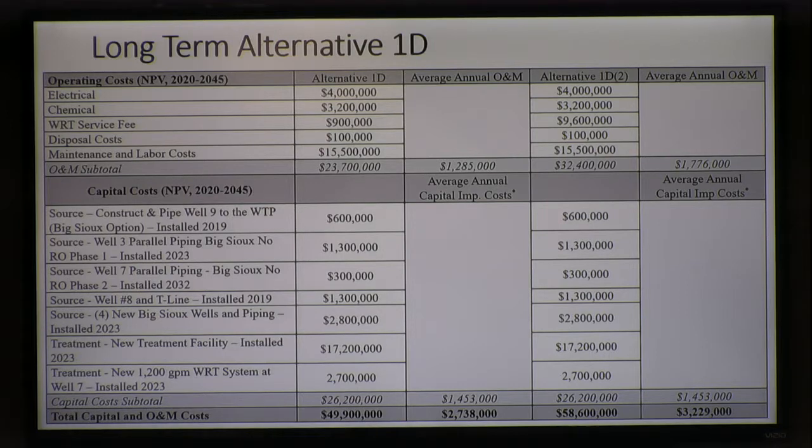You look at that and you go, electrical, 4 million? Yeah, that's 4 million over 25 years for electrical. And the purpose for doing that is to enable these costs to compare on an equivalent present value. You have to bring all of those costs to the present, and that's why you need to understand what these costs are for the total life of that.